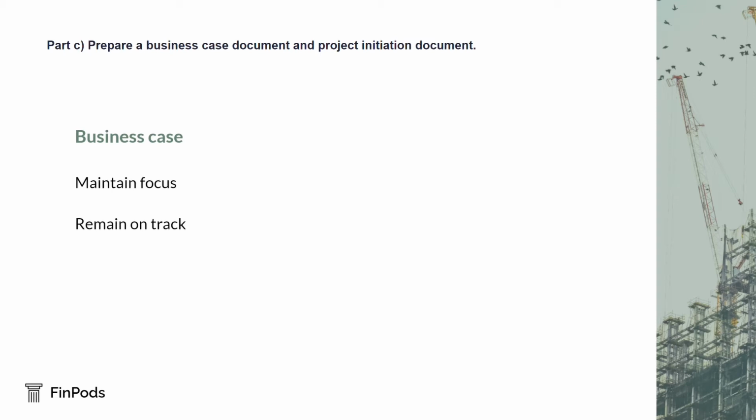A typical business case will include description of current information or issues, analysis of costs and benefits, including any assumptions and consideration of intangible costs and benefits, any impact of the project on the organisation in addition to the cost, such as changes in structure or recruitment of staff, key risks, including an assessment of their significance and any action to be taken to mitigate them, recommendations.